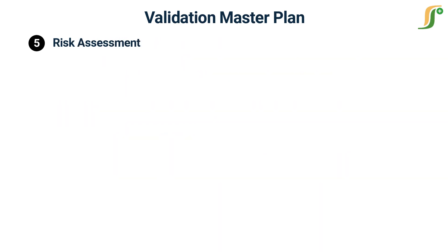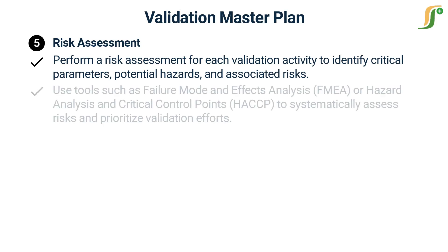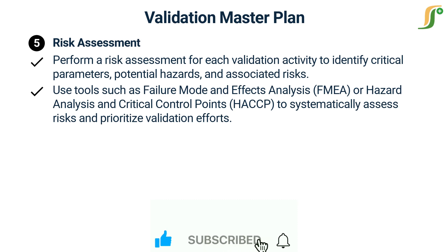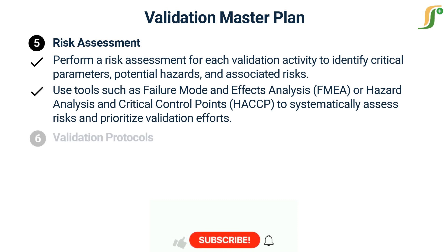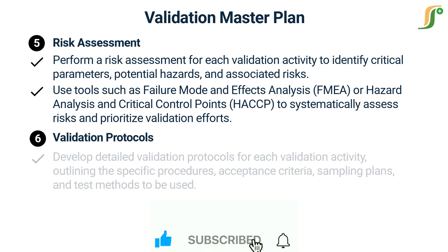The fifth step is to perform a risk assessment for each validation activity to identify critical parameters, potential hazards, and associated risks. Use tools such as failure mode and effects analysis (FMEA) or hazard analysis and critical control points (HACCP) to systematically assess risks and prioritize validation efforts. Document the risk assessment process and outcomes.